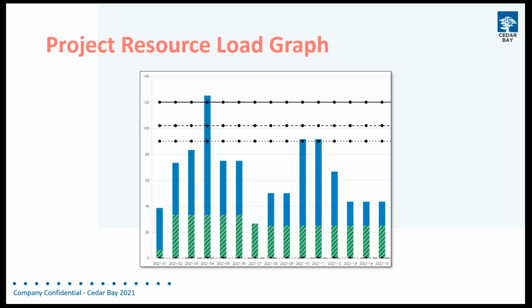So it's at this point, as a project manager, that I'd be concerned that my project is not going to be successful. I'm not going to be able to achieve the dates that I've put into the project because my resource commitment is too heavy. In reality, possibly because we have plenty of white space around the overload, it's actually not too much of a problem, because as I said, we're looking at an even spread of hours between the start and finish dates of the activities.